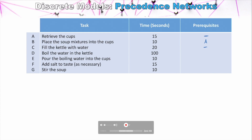Filling the kettle with water can be done without having retrieved cups or anything else, but to boil the water in the kettle we need to have filled it first — so this has a prerequisite of C. Now, pouring the boiling water into the cups technically requires retrieving the cups, placing the soup mixtures, and boiling the water, but we only list the immediate prerequisites. So the immediate prerequisites here are placing the soup mixtures into the cups and boiling the kettle of water. Tasks A and C are also prerequisites, but we don't list them here.